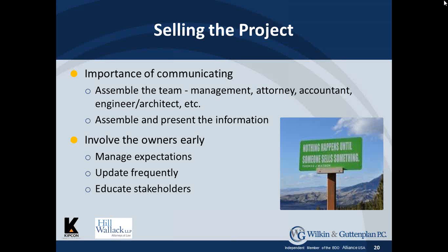How about the concept of supervision, which Mitch made clear that the designers provide general oversight but not supervision. Is the project sufficiently complex with multiple contractors to warrant supervision? Some projects may justify the hiring of an owner's representative to oversee the work. This would have to be done by separate contract with the appropriate individual or firm. And like Mitch, I will tell you that it is not something that managing agents are generally competent to do. In capital or construction projects, the skill set is simply different and requires construction expertise.